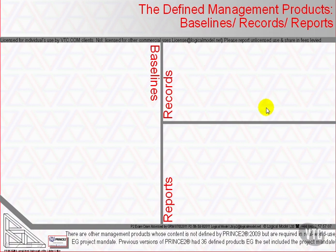The project will create many products. Imagine, for example, that the project's goals are to open a new bakery. Some products will be ovens and advertising materials. Others will include recruited and trained staff, contracts with suppliers and installed mixing machines.